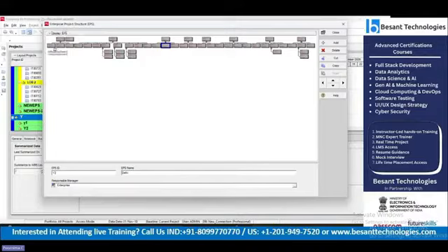Technically, for documentation purposes, as a planning engineer or project manager or whoever, if you are doing documentation in certain projects at the initial stage, it is required to submit the EPS of the organization. If you have this EPS entered in your system, you can directly make a print and share the document and close your documentation. If you do not have this data in your system, you need to rework it in an Excel or a Word document, and then share the documentation. For that purpose, we are provided with two versions. One is table version, the other one is chart version.